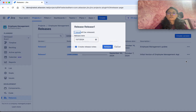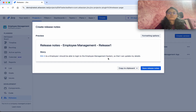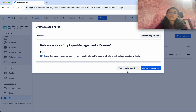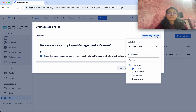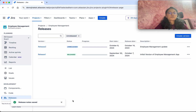We are going to release Release 1. Click Release — it says one issue will be released. You can also select the option to create release notes, then click Release. The release notes have been automatically created. You can preview them, save them, or copy them to the clipboard. Various formatting options are also available. Click Save Release Note.